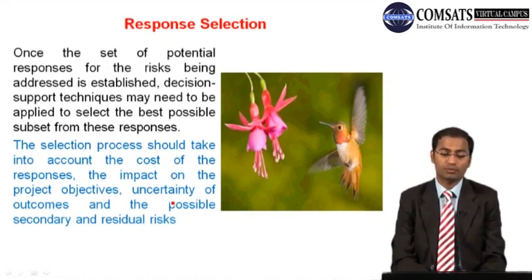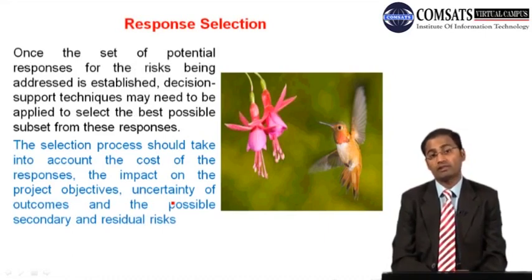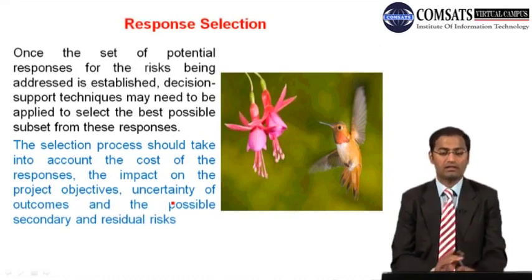Once a set of potential responses for the risk being addressed is established, decision support techniques may need to be applied to select the best possible subset from these responses. The selection process should take into account the cost of the responses, the impact on the project objectives, uncertainty of outcomes, and the possible secondary and residual risks attached with that.